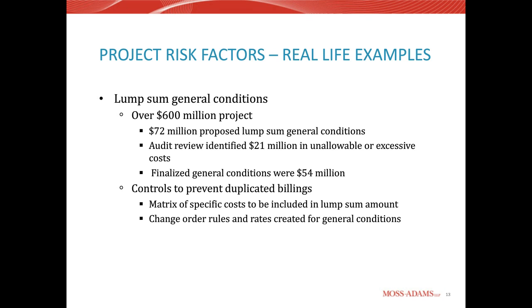Understanding what's in the lump sum general conditions. So, for example, equipment's a good item. If the project schedule gets extended and they have a pickup truck on site, that pickup truck's not costing the general contractor any more money. This was a 5-year duration, $600 million project, so that pickup truck has probably already been paid for within the first 6 years. So if the schedule extends 6 more months, the additional cost to the general contractor is very minimal.